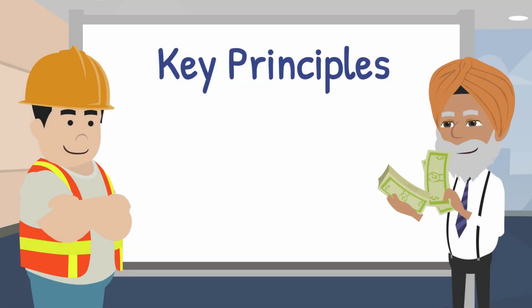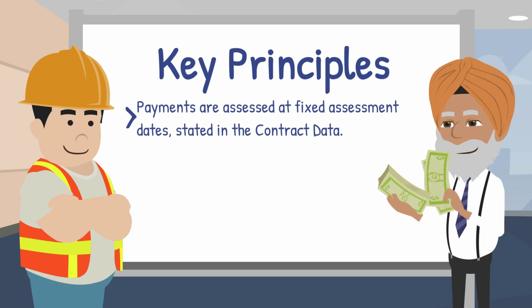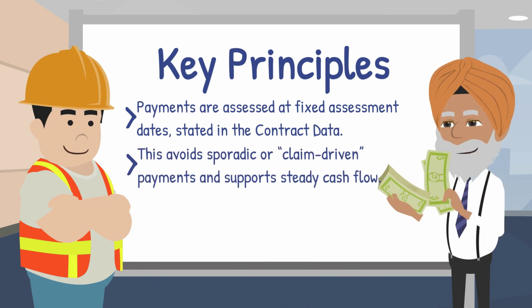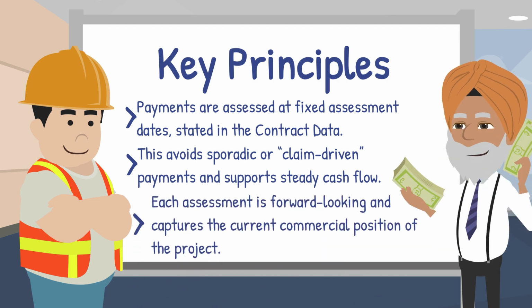Regular and predictable payments. Payments are assessed at fixed assessment dates, stated in the contract data. This avoids sporadic or claim-driven payments and supports steady cash flow. Each assessment is forward-looking and captures the current commercial position of the project.